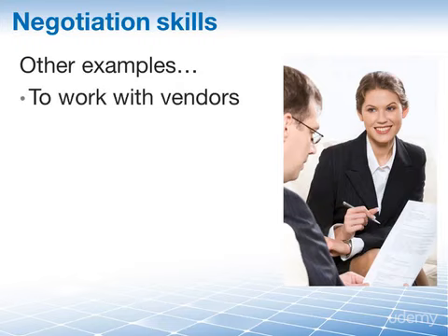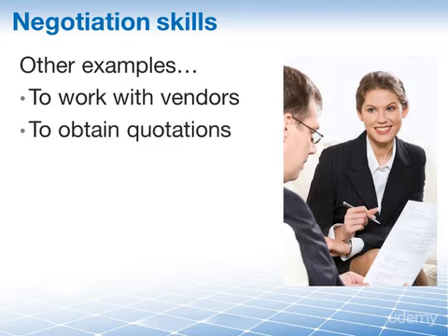Beyond using your negotiation skills to acquire and maintain the most effective team, you are also negotiating when you're working with vendors and contractors or others supporting the project. You are going to have to obtain their quotations or bids, then negotiate the appropriate terms and conditions. Likewise, you are going to have to select the right seller, formalize agreements, and continue to manage them for the duration of the agreement.